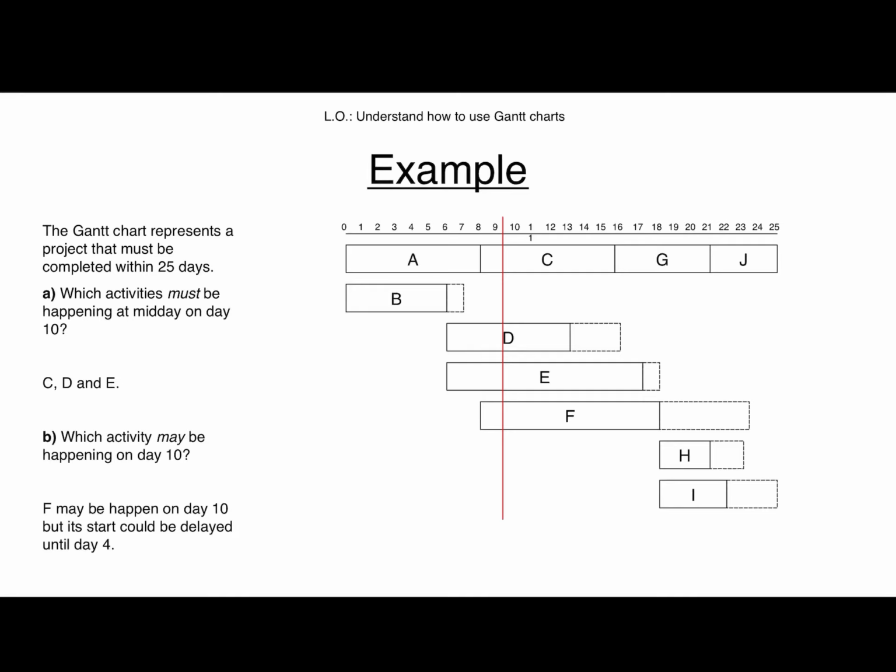And I could actually even delay the start of I enough so that the person that was doing H could move on to I, say.